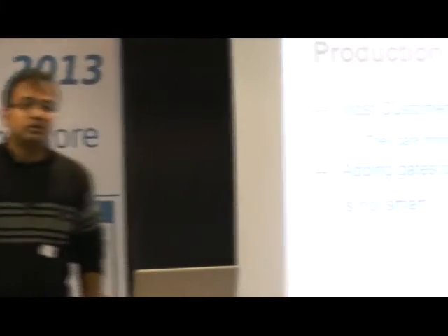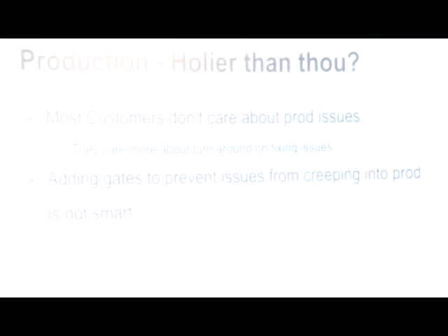If they think, oh my god, my login is broken, probably they'll not be okay with that. But then maybe there's a small CSS issue, but your UI guy is busy somewhere else. Would you not release that? Maybe you will. That's a conversation you would probably need to have. Not all bugs are the same. A data corruption issue, that's a big deal, don't do that. But most other things, maybe you can. But it's not your call, it's your customer's call, and make sure you have that conversation.